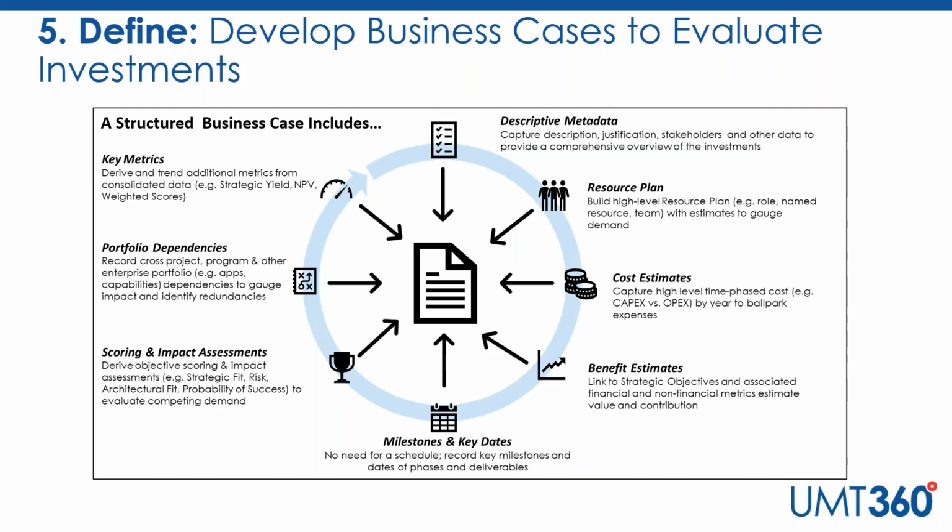So we look at the business case, obvious data we want to capture, descriptive metadata, much like a project charter. We want to understand resource implications. We do want to look at cost estimates. We do want to understand the impact that this work will have on the metrics that are being defined relative to each of the strategies. We want to understand how this fits in. We want to understand the key events and milestones and the dependencies, not just from a project to project or initiative to initiative perspective, but the dependencies as they relate to the broader ecosystem of our portfolio, so capabilities, applications, value streams, whatever it may be.